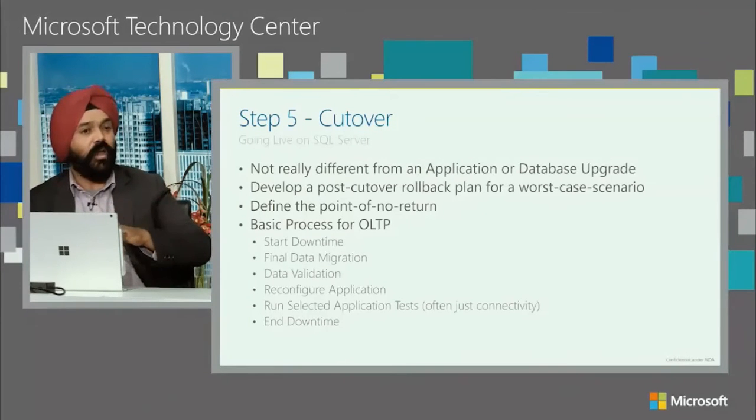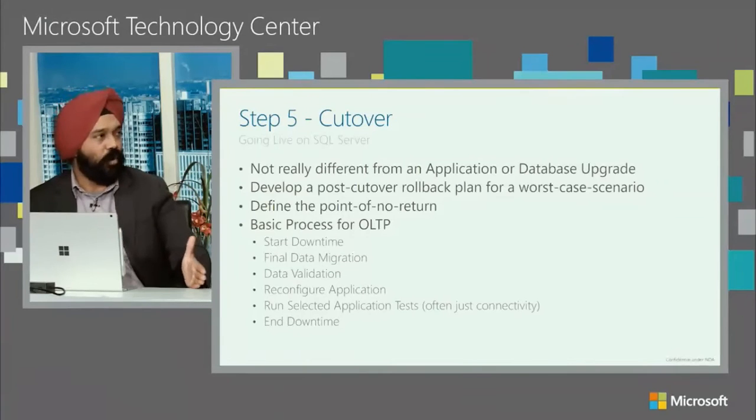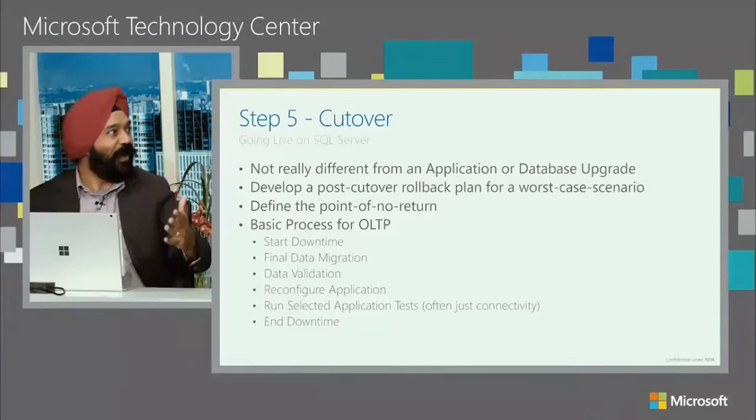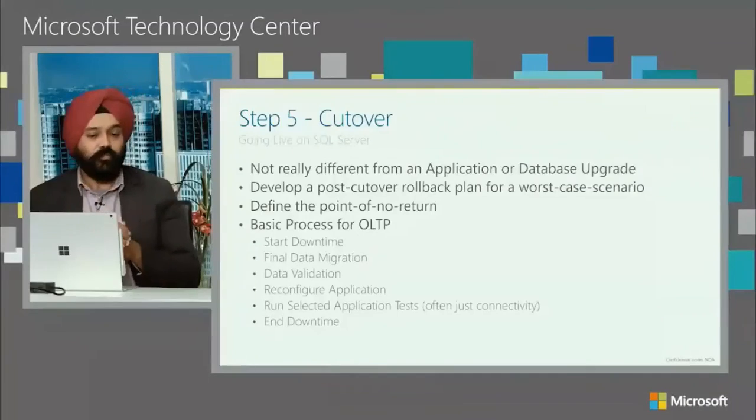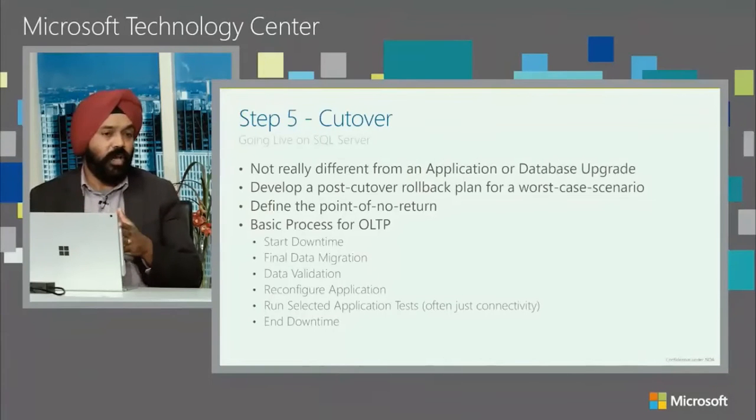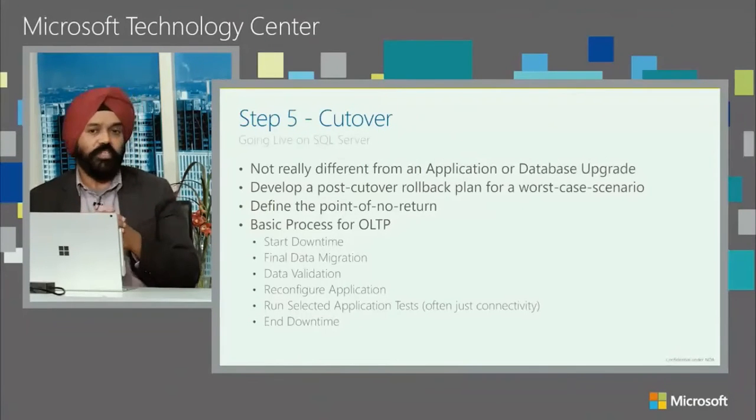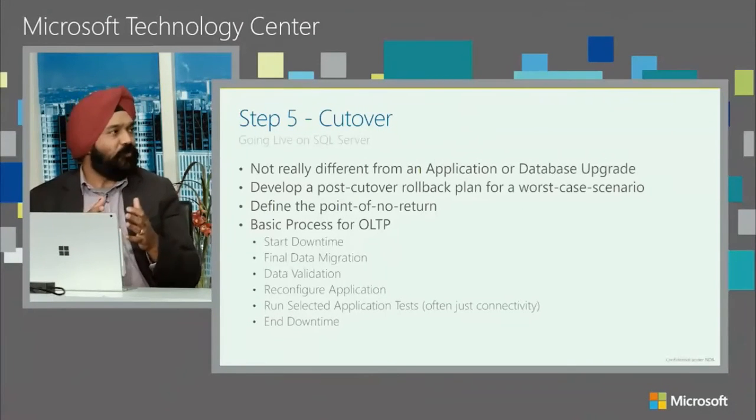And again, this is where assessment, I go back to the step 1 we discussed, is so important. Because the assessment, if you've done it right, actually tells you where you need to use what type of cutover. For example, it ranks all your Oracle applications by complexity, right? Not somebody, Raj, thinking that this application is very complex. Because honestly, when we talk to the application owners in customers, our experience is that every application owner says, my app is very complex. You're not going to be able to migrate, right?